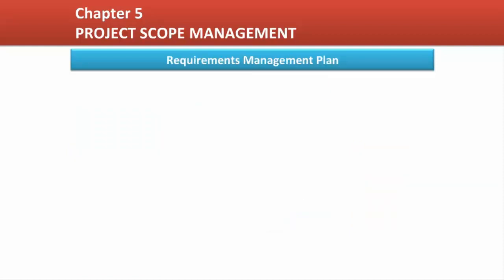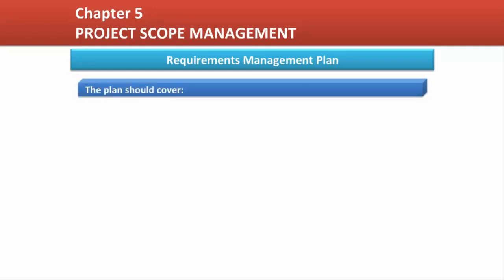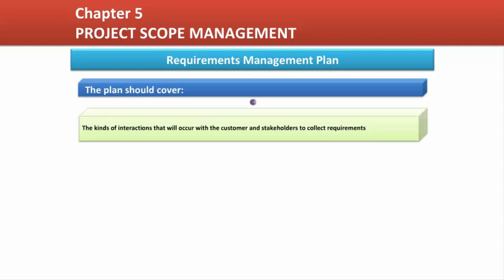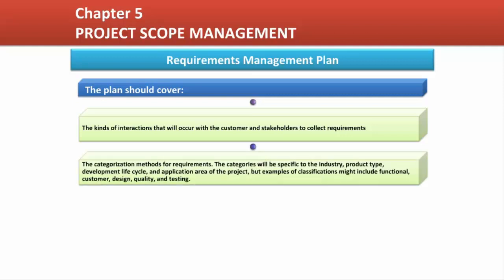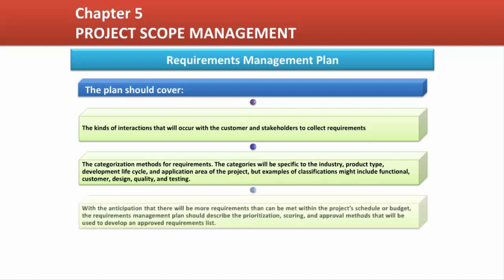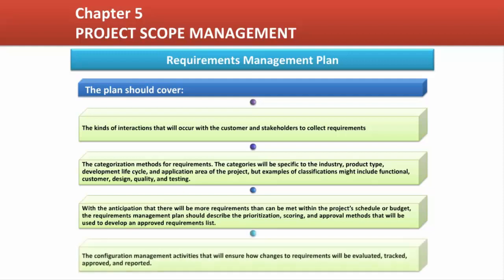Requirements management plan. Requirements are the constituent needs, objectives, and specifications the project deliverables must meet in order to be successful. Pre-planning is needed to determine how requirements from the customer, stakeholders, and project team will be collected, organized, prioritized, tracked, and measured. The completed pre-planning is documented in the Requirements Management Plan, created in the Collect Requirements Process Section 5.1, though a subsidiary component of the Project Management Plan.